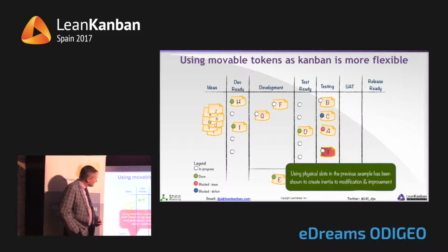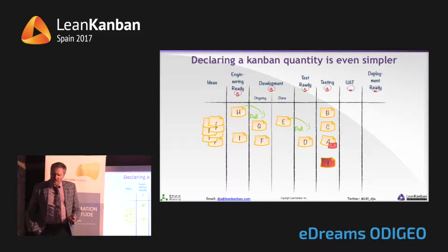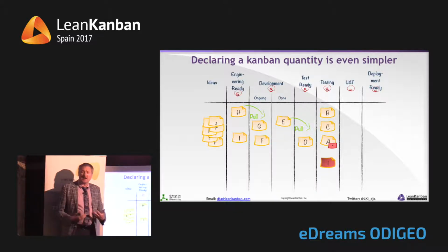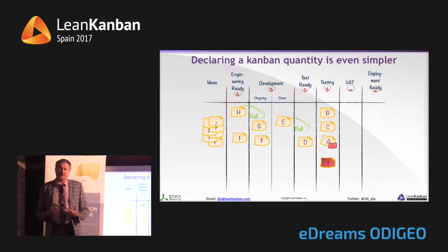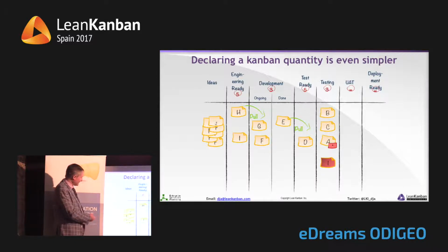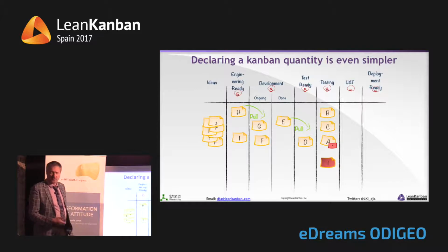And then the style of Kanban board that I documented in the book, the style that we were using at a company called Corbis in Seattle in 2007. And these are virtual Kanban. Now we just have the WIP limit as a number at the top of the column. This is the most flexible style of design, but it requires the highest level of discipline to actually stick to the limit. There's no physical constraint on what the limit is. You could easily put 10 tickets in this column where it says 3 if you're ignoring the 3.